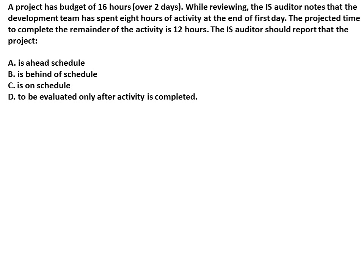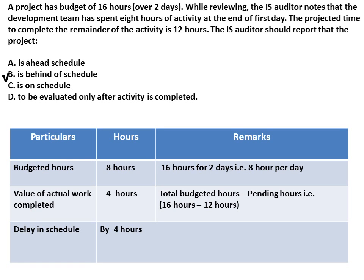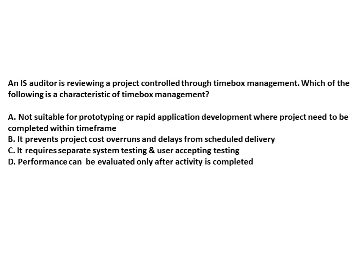EVA calculation example: A project has a budget of 16 hours spread across two days. The IS auditor notes the development team has spent 8 hours of activity at the end of day one, but 12 hours of activity still remain pending. The IS auditor should report that the project is behind schedule. At the end of day one, 8 hours of activity should have been completed, but the actual value of work completed is only 4 hours (total budgeted hours minus remaining hours). Therefore, activities are delayed by 4 hours.